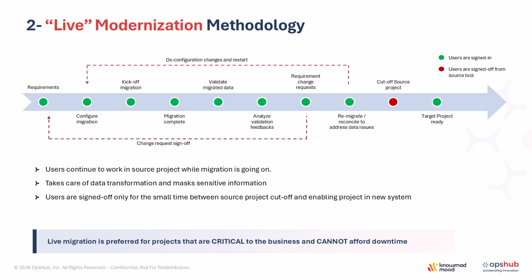And you also now get the flexibility that if a team at the last minute is not able to cut over for some business reasons, they can delay their cutover to a subsequent cutover period. So this allows very easy modernization for global teams where there may not be any weekend to do the migration work.